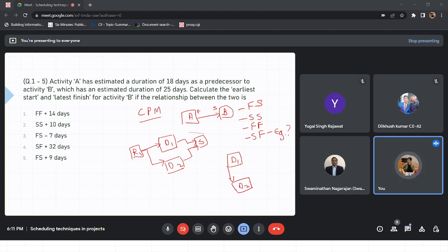D2 can only start after D1 is started. Correct. So there has to be some kind of a lag in design also: once we start the design of the first component, before the design completes, we can start on the second component also. Yes. Typically, we wait until about 10 to 15% of the work is done, then we start D2. Okay, because some core architecture baseline is done in D1, and that enables us to start D2. I'm talking about a lag of, let's say, 10% of the work of D1. So this 10% to 20% becomes a buffer here, right?